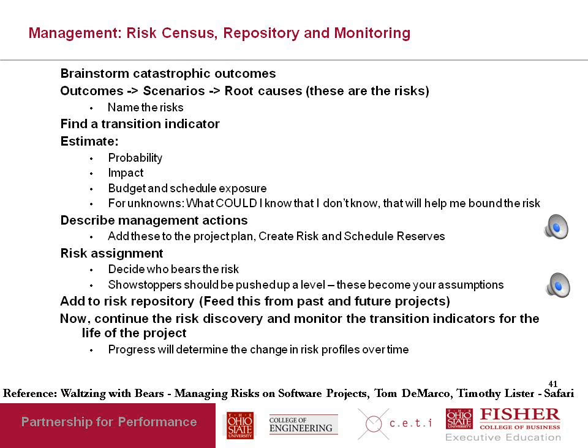Once you have your architecture in place and you're in the construction phase and everybody's just developing new features, the risk that your project manager or your lead architect may leave may be low, because even though the probability might be high, the impact of that risk might be less than what it might have been if that person left in the middle of the elaboration phase when the architecture was still being developed.